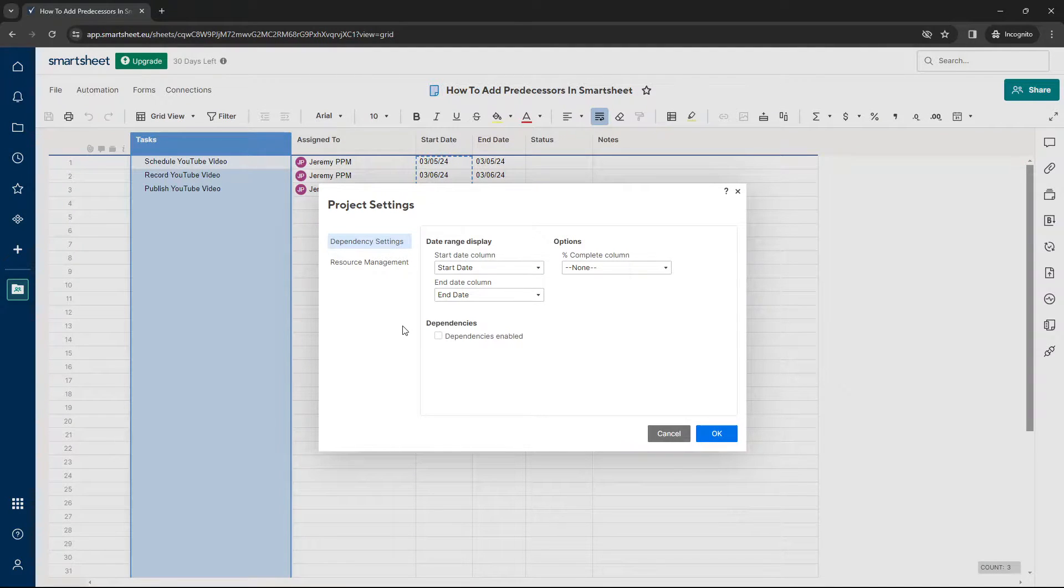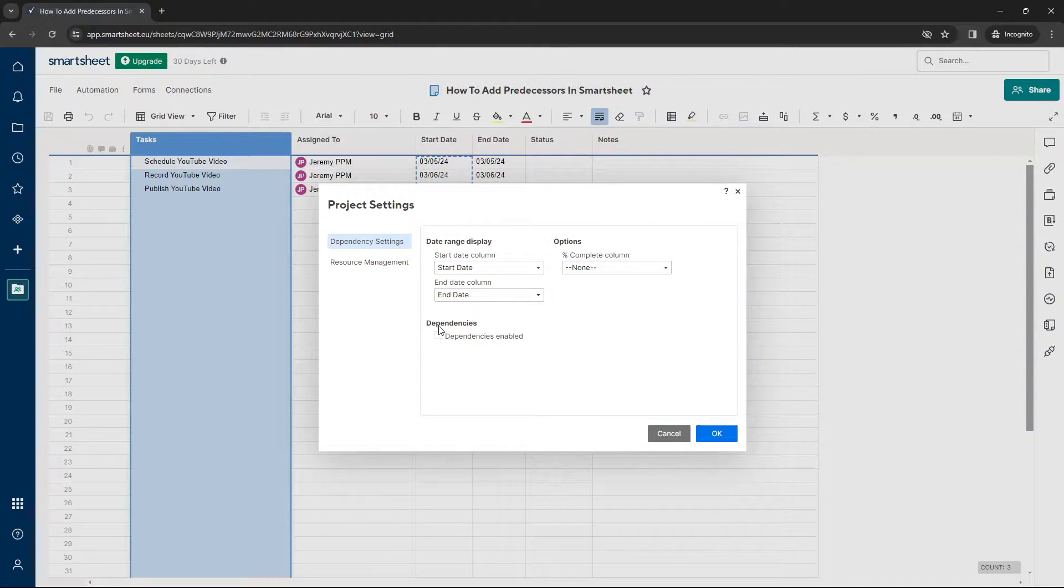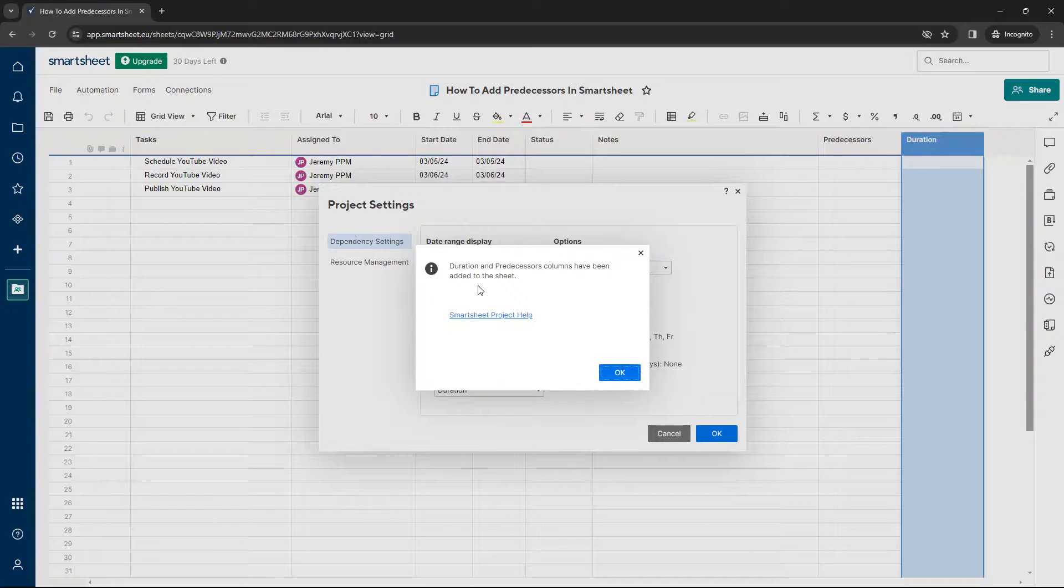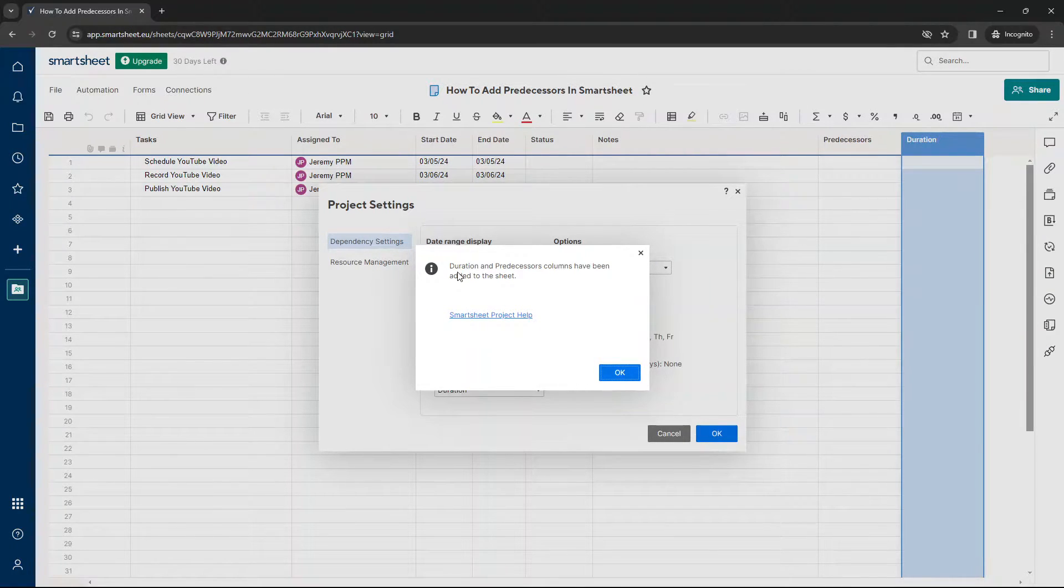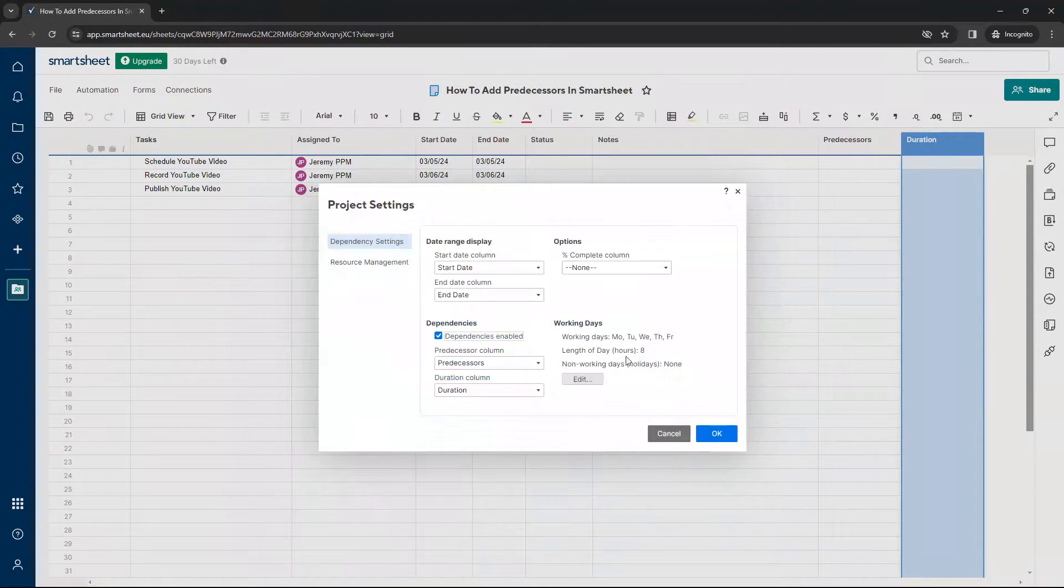At this point, you want to enable dependencies. So there's a checkbox just here. And once we select that, it will come up with this message. Duration and predecessor columns have been added to the sheet. And I'm going to press OK.